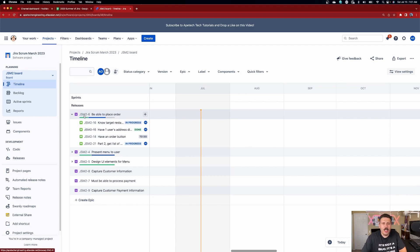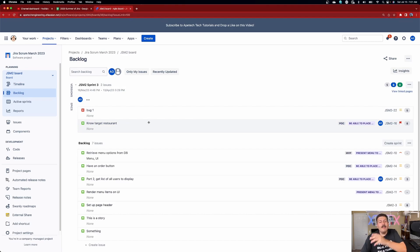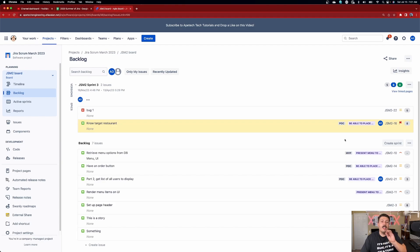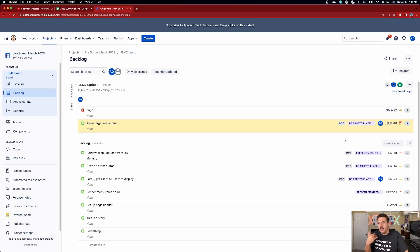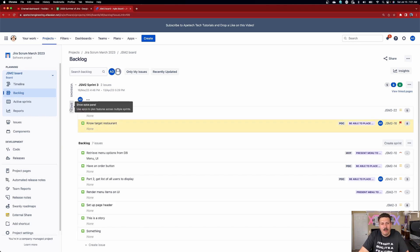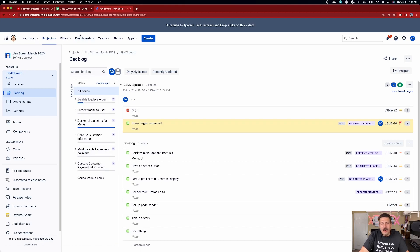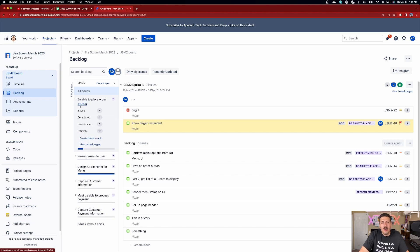Now in the backlog view, pay special attention to JSM 2-6. When you go to the backlog view, you're going to have a very hard time finding that epic, because Atlassian understands the value and positioning of the epic relative to sprint planning. It knows that epics are supposed to be bigger than your sprint. So ideally only your tasks, bugs, and stories are planned into a sprint. Atlassian strategically hides the epic from you and puts it in an epic panel on the left that you need to expand.